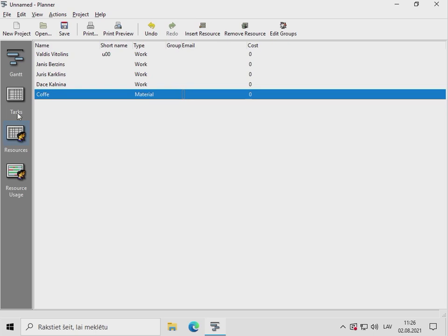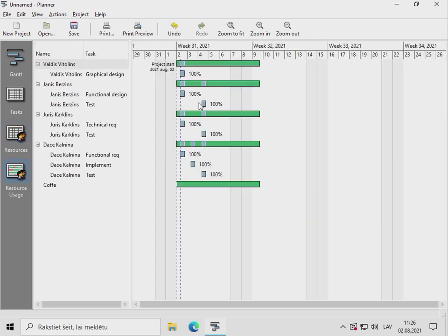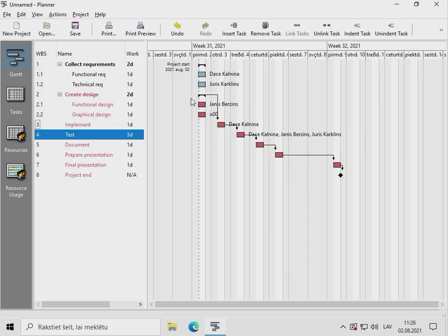So this is also one of the ways you can describe that everybody has something to do here, but of course this is a somewhat poor design of your plan, because when you actually follow this plan, you will still need additional management of how exactly these persons will work on this testing without disturbing each other.